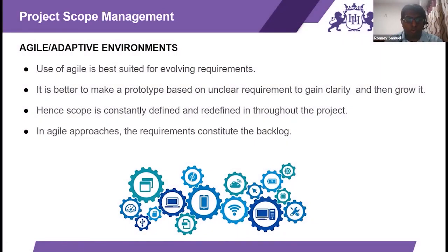Okay, in the overall scope of things, all the work we have to complete is listed in another thing which we call a product backlog. That is under the control of a product owner in Scrum. The sprint backlog is under the control of the team. The team takes the product backlog from the product owner and makes from that the sprint backlog based on the priority given by the product owner.